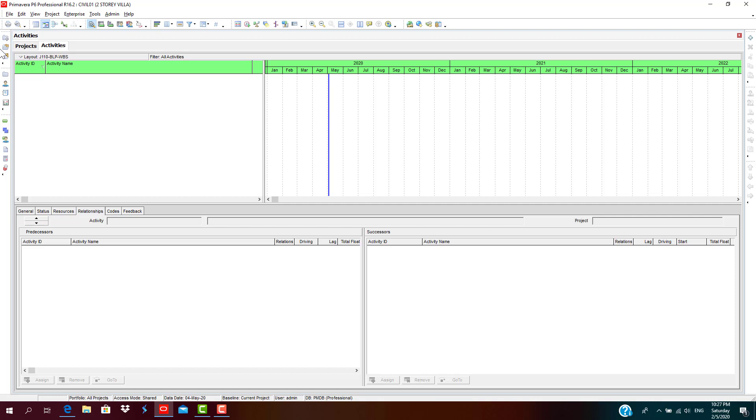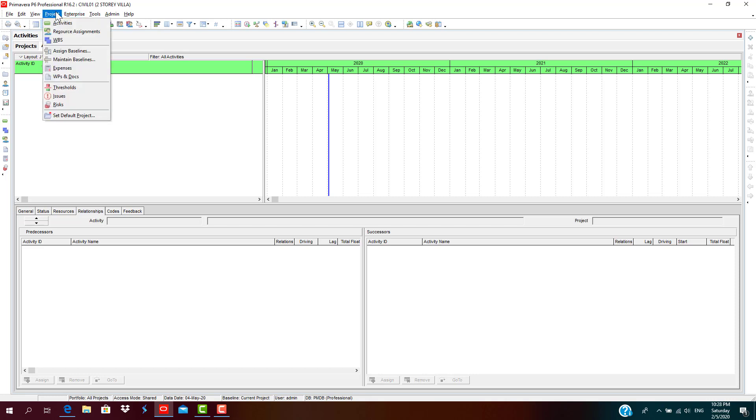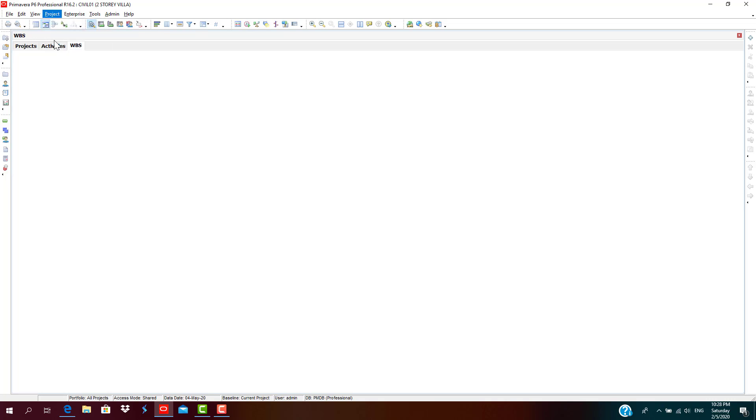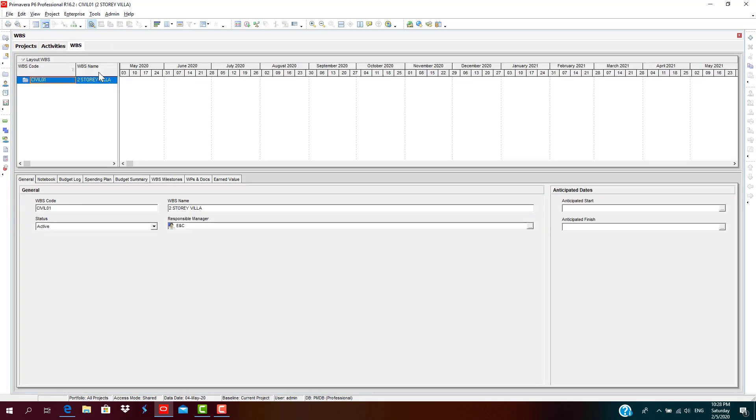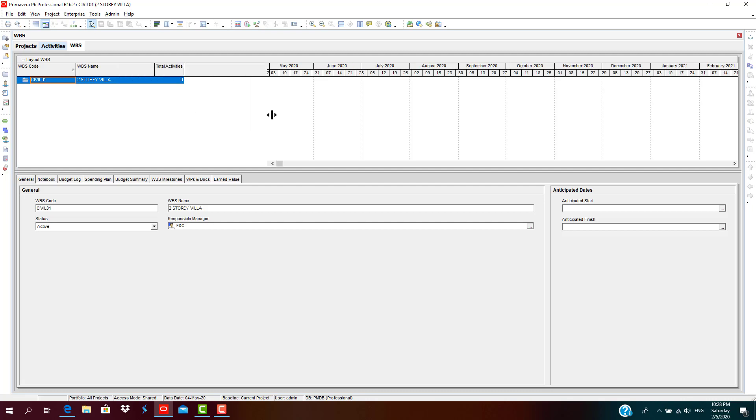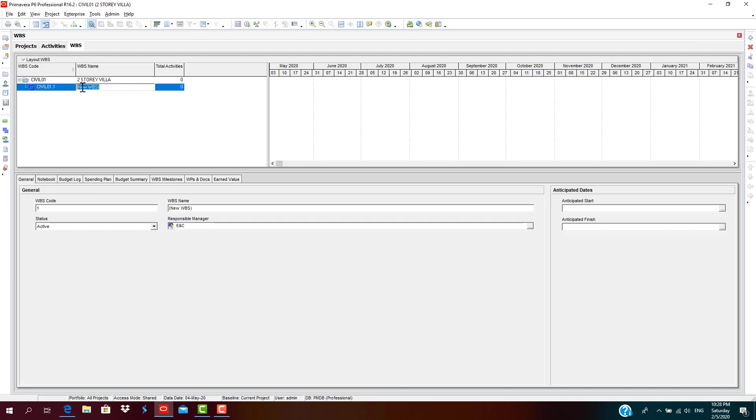Go to Project in the menu bar and click WBS. The WBS section has been opened and in the Assigning toolbar here, click Add.